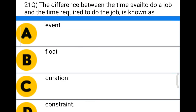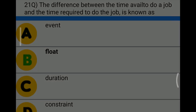Next question: the difference between the time available to do a job and the time required to do the job is known as — Option A: event, Option B: float, Option C: duration, Option D: constraint. The correct answer is Option B, float.